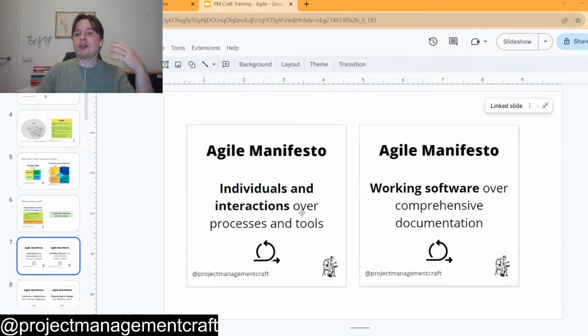Then you have the second item in the Agile Manifesto, which is working software over comprehensive documentation. The Agile Manifesto started with IT because there was a group trying to execute IT projects, and they had dissatisfaction with the way those projects were being executed, trying to follow a waterfall or traditional approach where you plan a lot up front, even though you have a lot of uncertainties and unclarities at the requirements level, and there was a lot of focus on documenting something, but in the end it would take a long time for a customer to see the software, to have a demo or something like that.